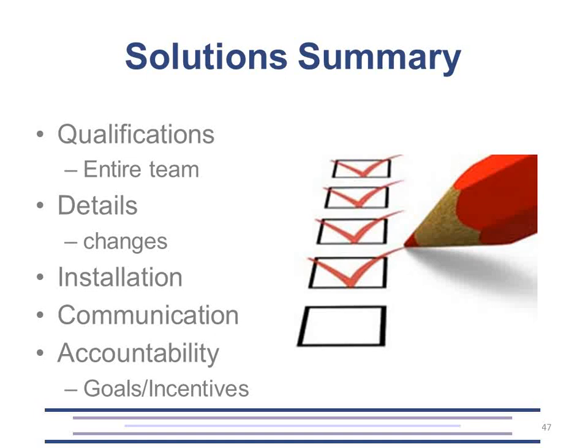And then in the field during construction, based on some roadblock or new detail that arises, they have to be changed. But those details need to be documented. And this takes time and costs money and isn't as easy as providing generic sequences and generic operation details or drawings. But that's what sets the experts apart from the average project team.